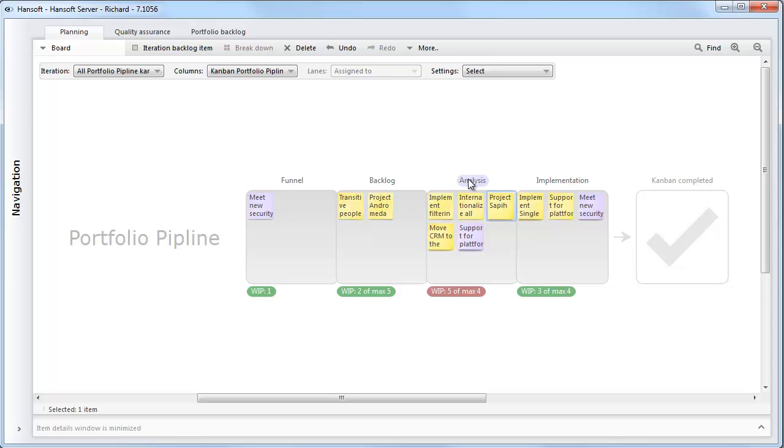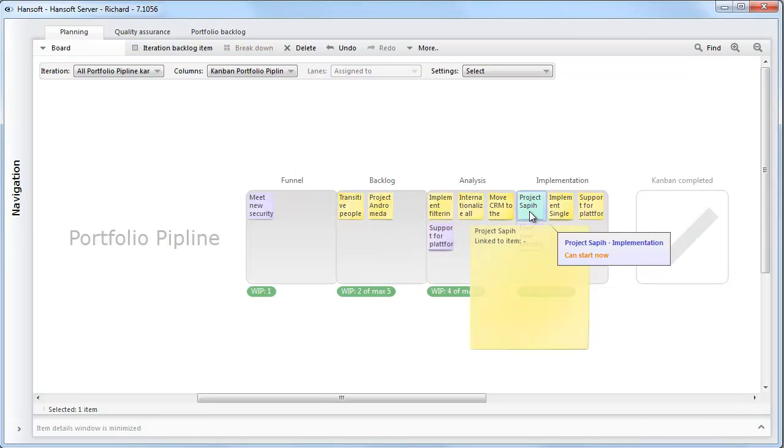So this phase is quite effort intensive, so it will have a work in progress limit that reflects both the capacity of analysts and primarily the desired throughput you want to have from analysis to implementation. Here in the transfer from analysis to implementation, this is where the responsibility for the epic is handed over from the portfolio level to the development programs.